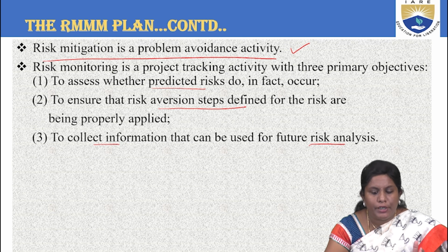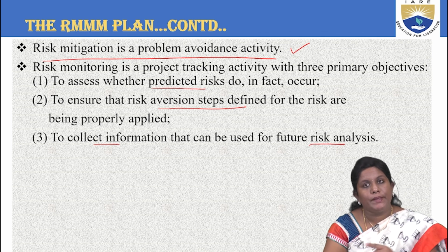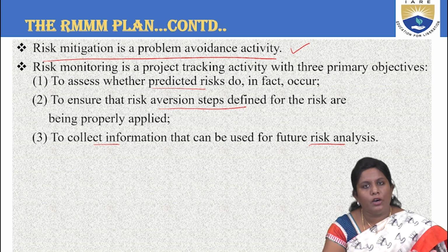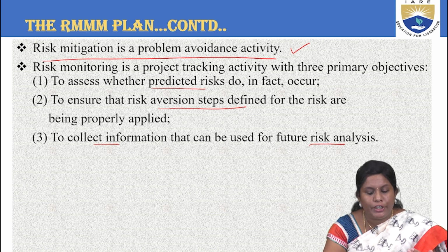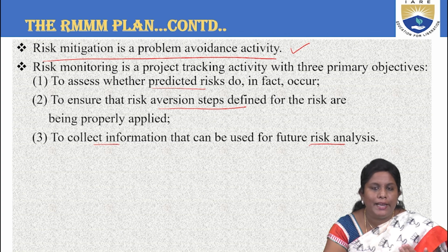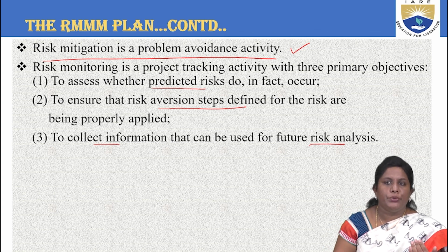In risk monitoring, you are treating it as a project activity that involves three different goals. The first goal is to assess whether predicted risks occur or not. The second is to ensure that the risks are refined. The third is to collect all of them for future use.